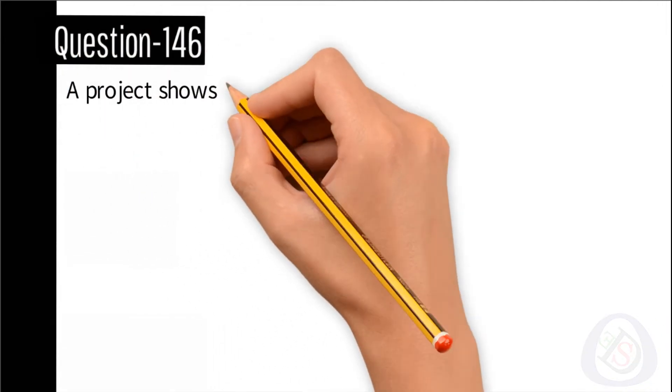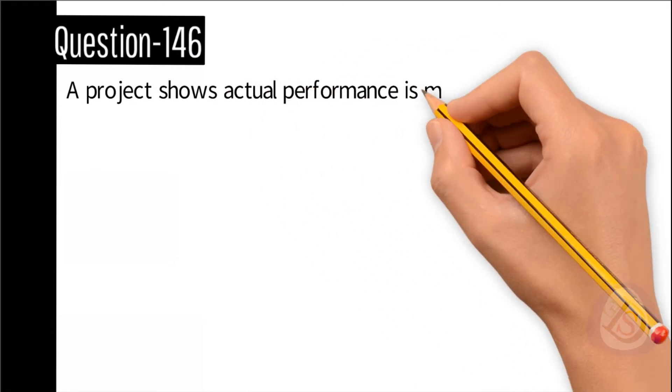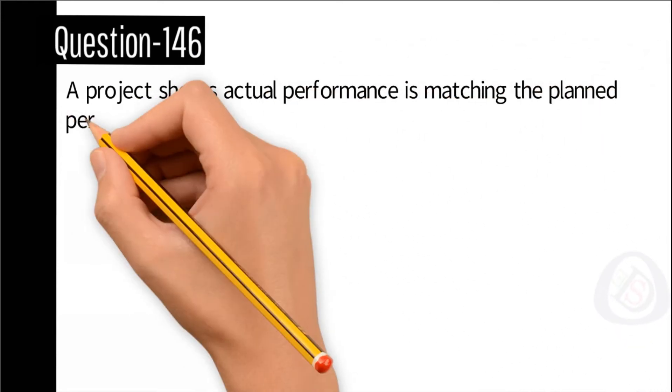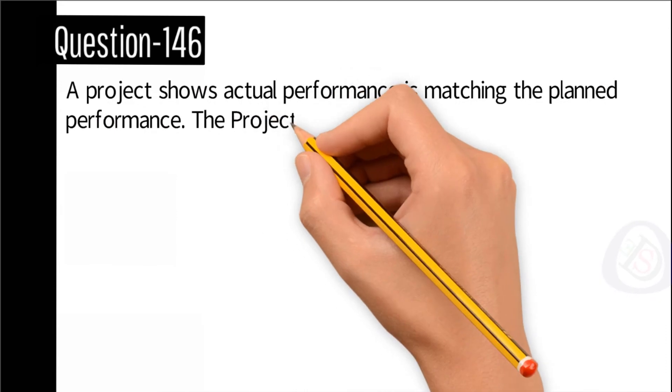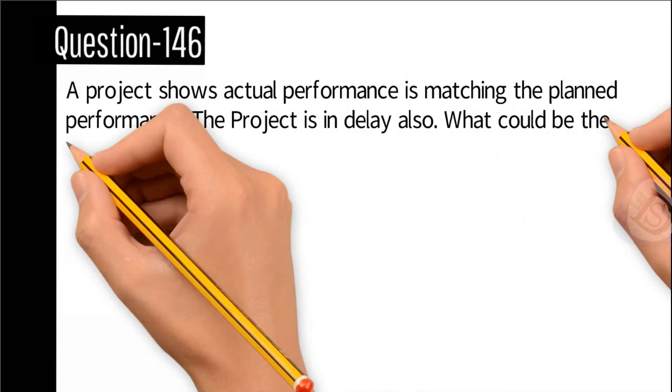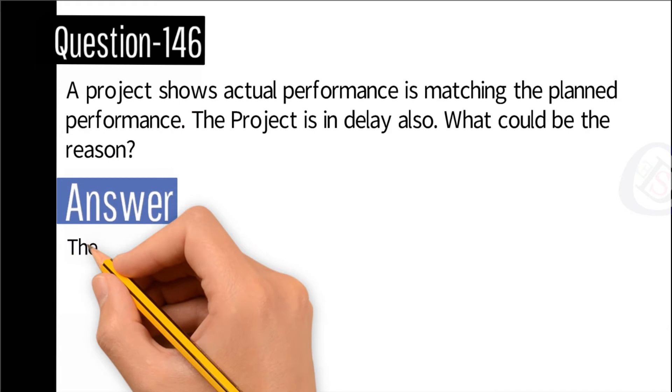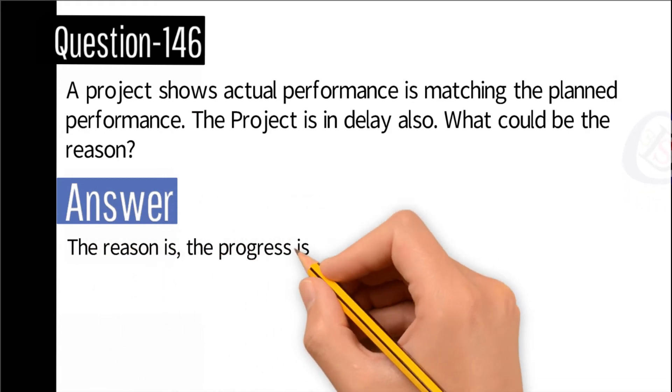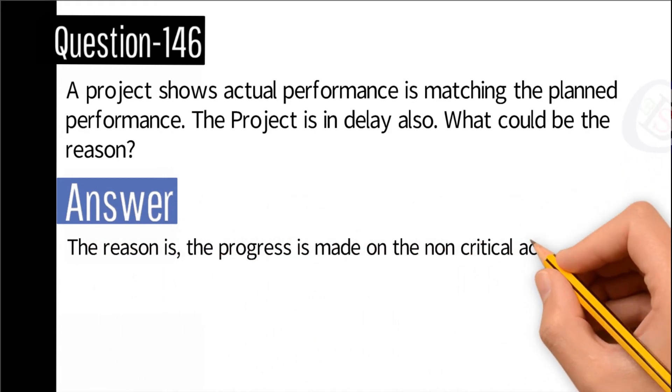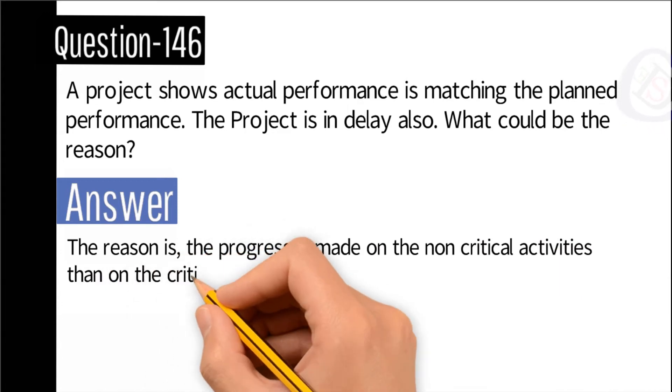Question number 146: A project shows actual performance is matching the planned performance. The project is in delay also. What could be the reason? Answer: The reason is the progress is made on the non-critical activities rather than on the critical activities.